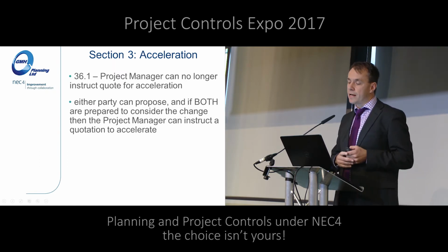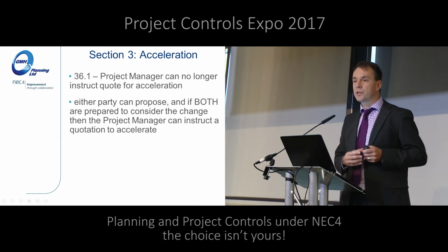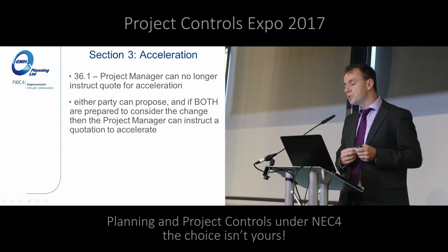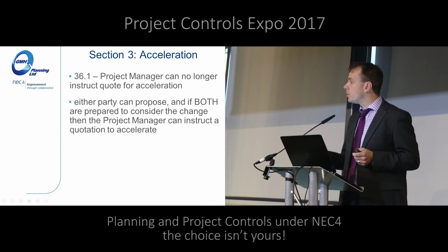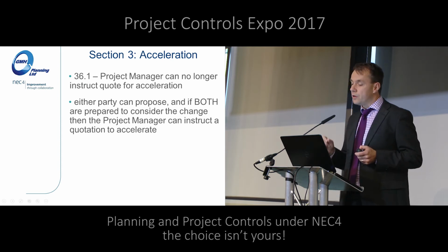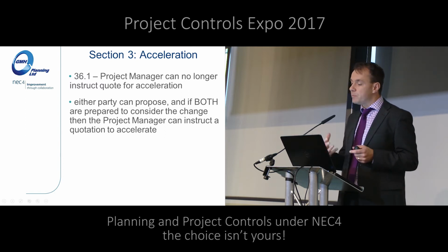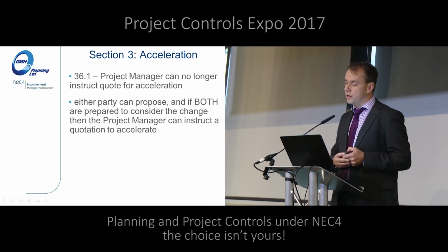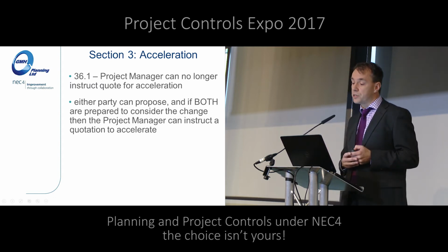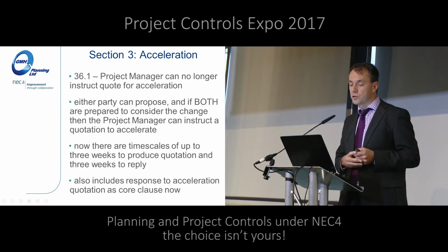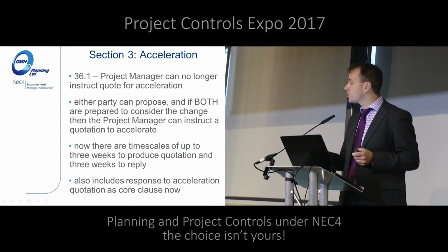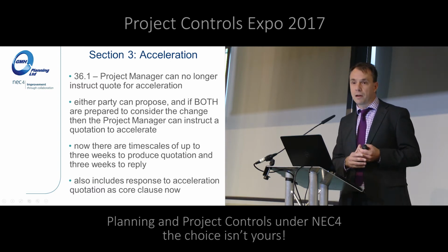A few tightening up elements around acceleration. So even more forces the case that acceleration has to be by agreement. So now the project manager can't even instruct a quote without your contractor agreement. So it has to be by agreement that a quotation is submitted. Previously, they could instruct a quote, but now, if parties are willing to consider it, then they can instruct the quote. They've added in specific timescales, so 3 weeks to produce the quote and 3 weeks to reply.